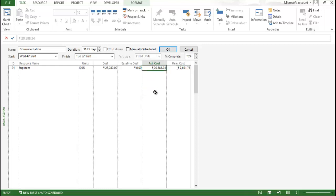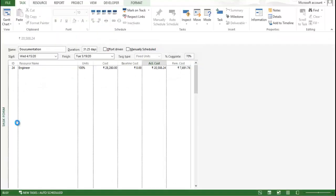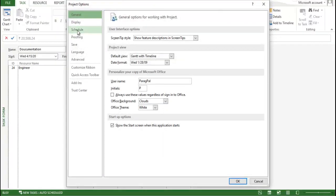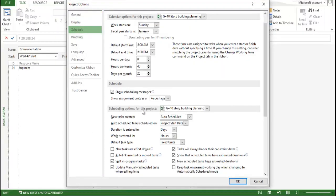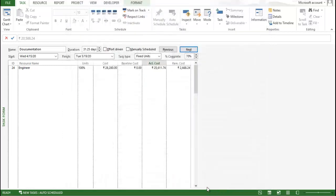But what if I want to provide this cost manually? For that we need to go to the file. Go to the option. And after that you need to go to the schedule and come down and click here at the bottom. Always actual costs are always calculated by project. And take this particular data and click on edit to the total actual cost will be spread in the status date. And click on okay.